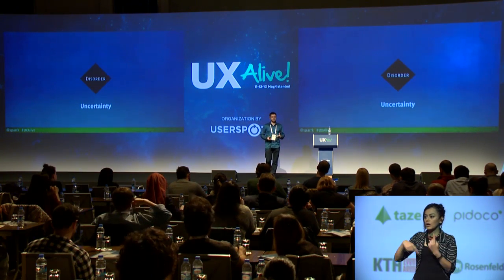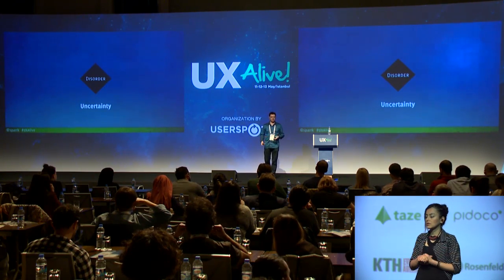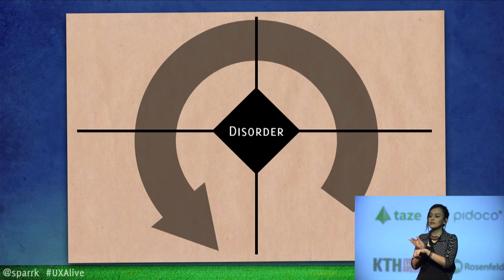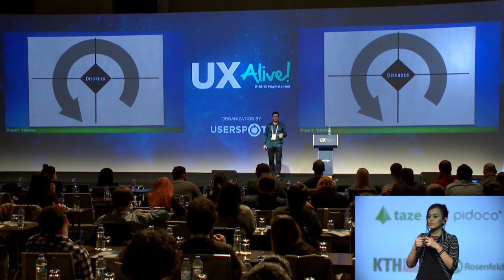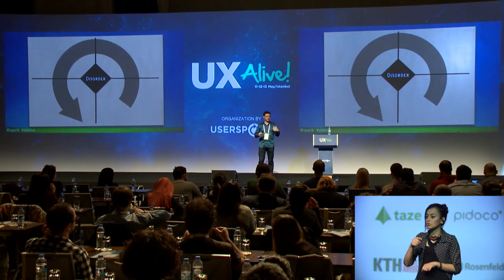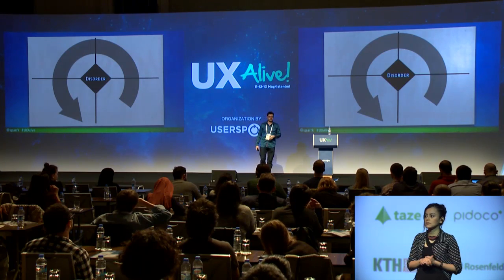So the way you get the things that you're working on, the feature requests or the requirements, whatever it is, out of disorder is you start to move it into one of the 4 areas or regions that surrounds it in the model. The way this model works is you start in the bottom right-hand corner there, and you go up through anti-clockwise towards the bottom left-hand corner in order of increasing complexity of the thing you've been asked to build. So every time you get a feature request, you need to figure out which of those 4 domains it lives in.